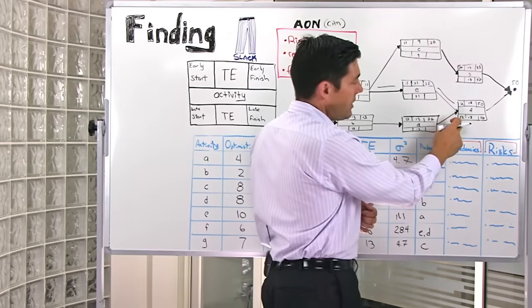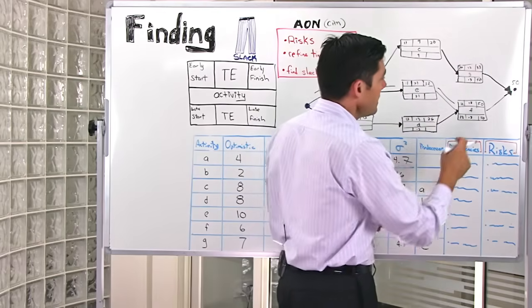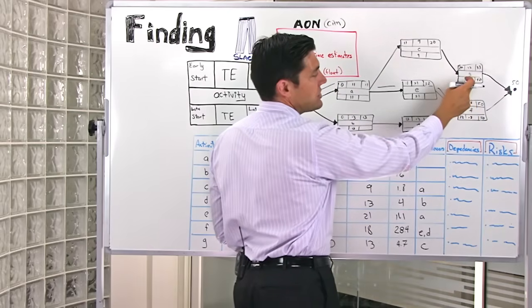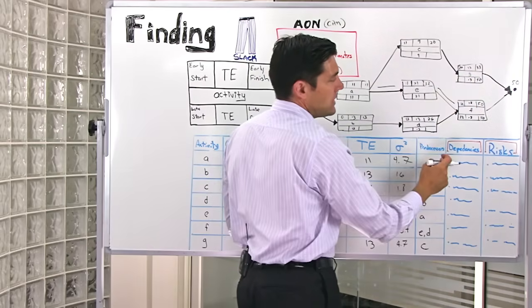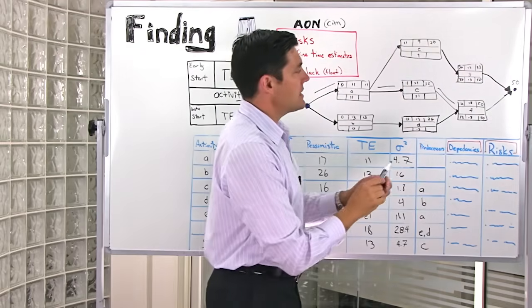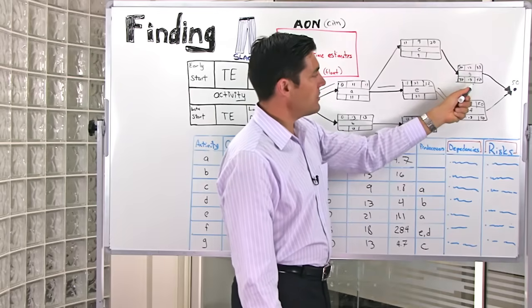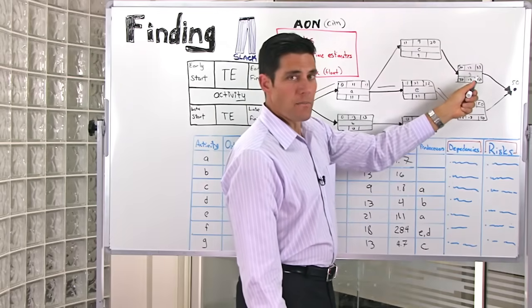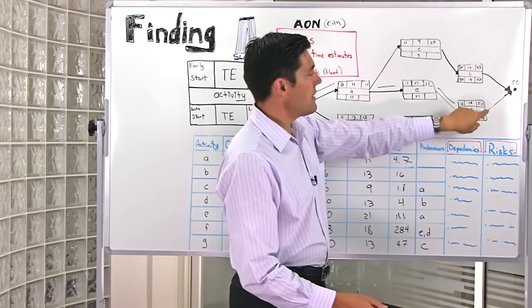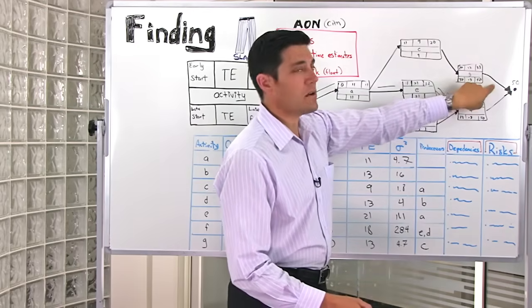The latest that this project node activity can start is 32 days, the same as it was before going forward through the project. Going backwards, however, you'll see that since I don't have to actually start activity G for 37 days, because even if I do it at 37 days starting it, it'll take me 13 days to get through it, and I'll be completing it by the 50th day, which is the same time that I'll be completing task F. Therefore, I've just found that there's some slack right here along this path.